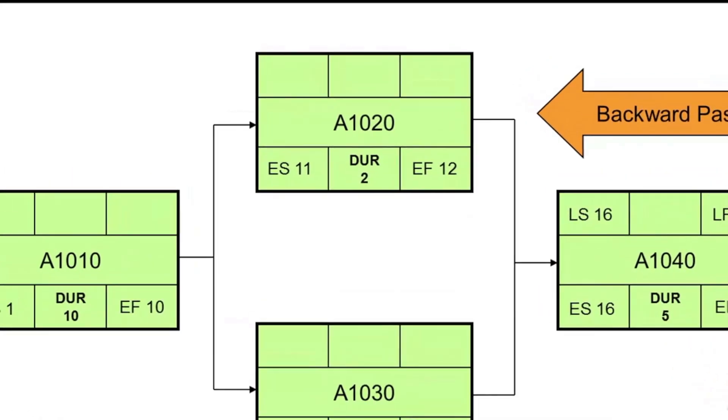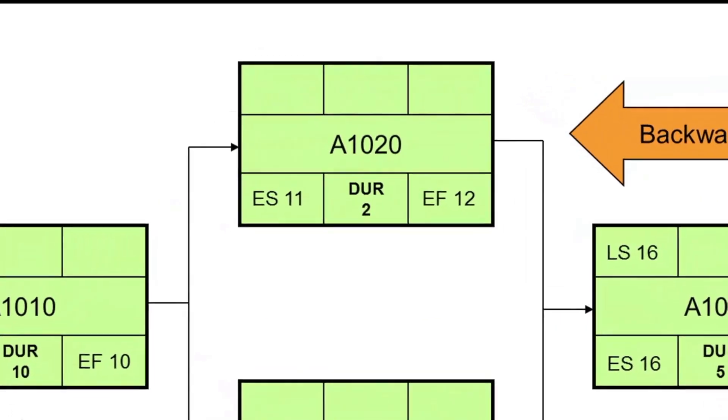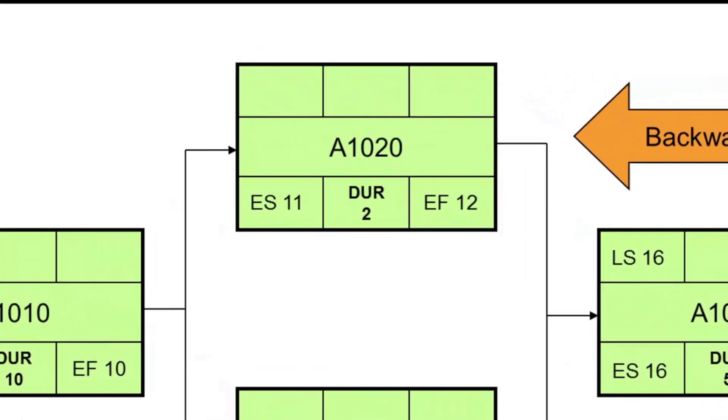Now look at A1020. Its late finish date is day 15, because that is the prior working day from day 16. Now, we subtract two days' duration from 15, and then add one to get a late start date of day 14.